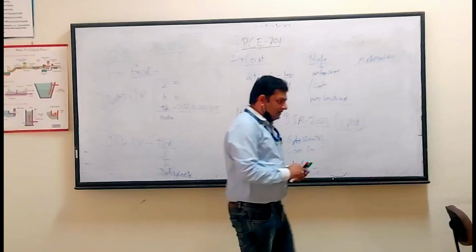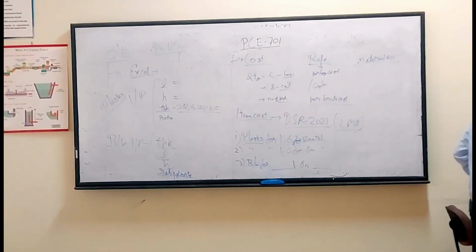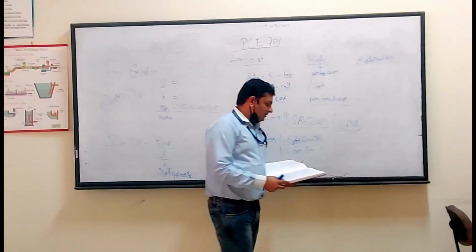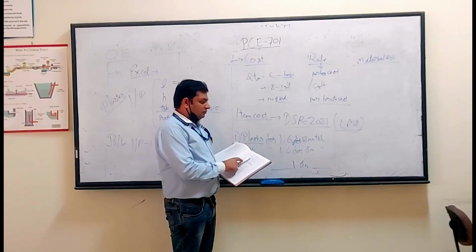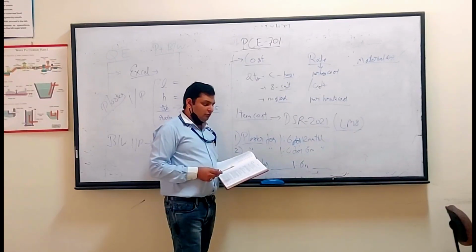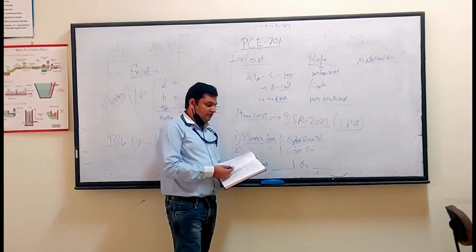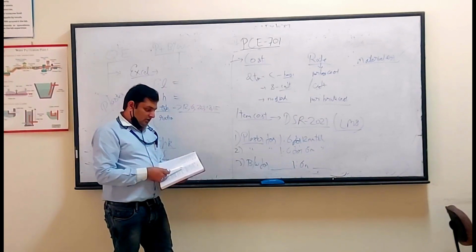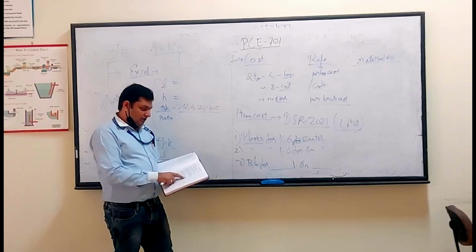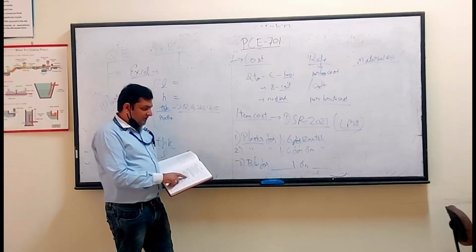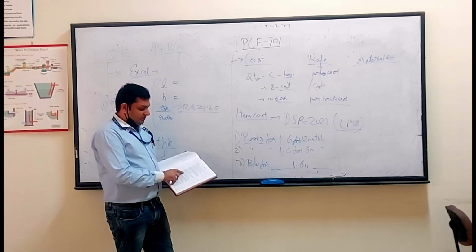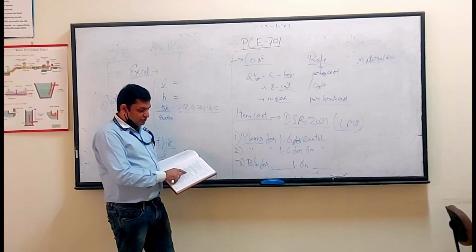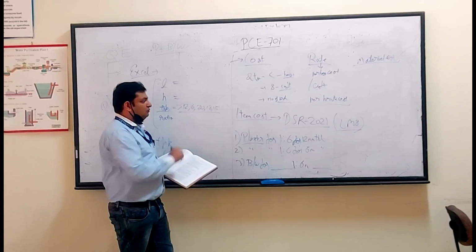This is the item given in the DSR in section 6, brickwork. You will see brickwork with common burnt clay FPS bricks of class 7.5. This is not the foundation element, this is the wall masonry up to level 5 above the plinth level. So you will take the mortar ratio 1:6, then divide it 1:4, 1:6. So you will take the rate for the 1:6 item and for per cubic meter brickwork.